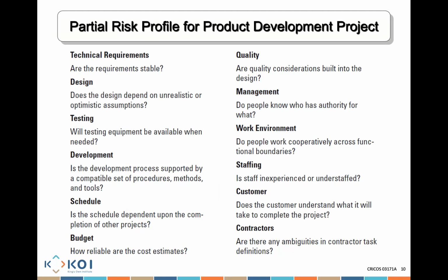Testing, will testing equipment be available when needed? Oh, no. Okay, well, that's an issue. Is the development process supported by a compatible set of procedures, methods, and tools? Does the schedule depend upon the completion of other projects? So all of these things highlight more things that we are able to bear in mind at any particular point of time.